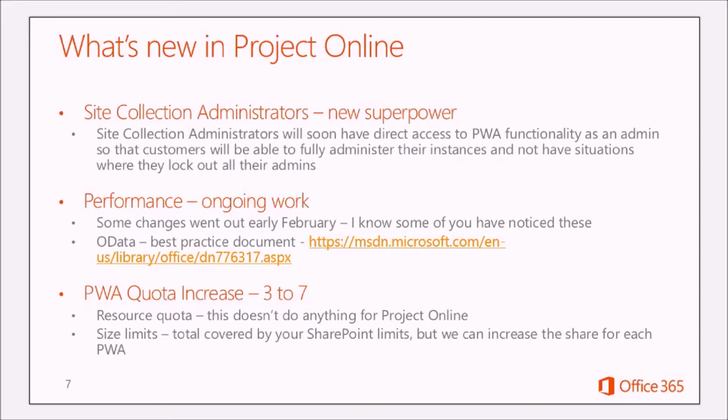Hey, Brian. Yes, Adrian. While we're on this page here, on OData, we're actually going back through and trying to make that better. There's certainly the SSIS solution and so forth, but we've recently changed some architecture on the servers itself that will allow us to do larger page sizes. Currently in the OData, let's say you want to receive 400 rows. Well, it's going to receive no more than 200 at a time, and each one of those calls is distinct. It brings it in, assembles it, pulls it down to the client, and so forth.